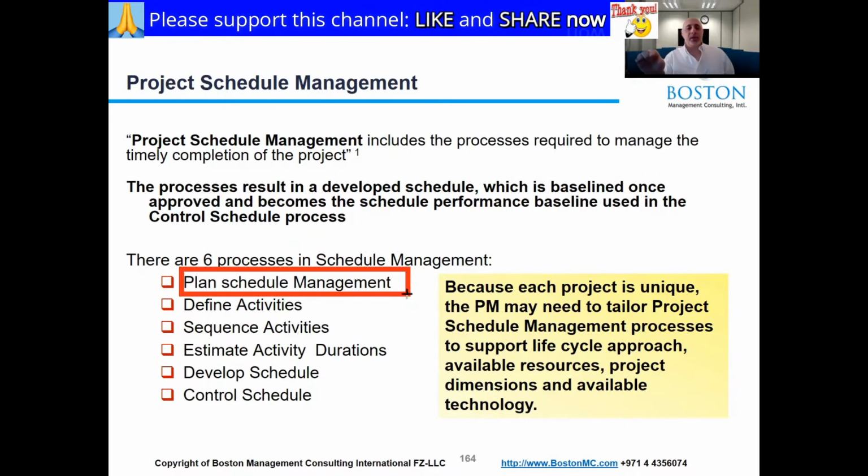It says plan scope management, and here I'll show you why we have plan schedule management. But beyond this, this is where we will identify the activities. When you identify them, you use decomposition from the WBS. You just break down the WBS into its activities, and don't be worried. You don't have to be technical because you're not the one who has to do it. You ask the team lead who you've assigned that WBS task to go and figure out the activities with their own teams. They know what they're doing. It's their specialty. It's not yours. Your specialty has to be project management.